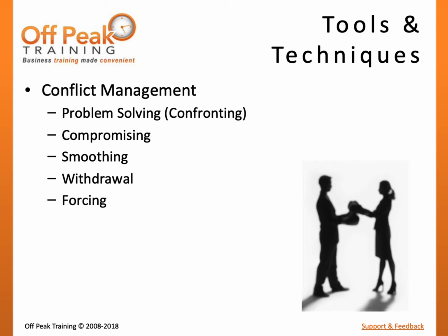Forcing provides a win-lose situation. One party's conflict is resolved while another party remains conflicted. This is not a preferred resolution. Decision-making may include negotiation or voting techniques, such as majority, plurality, or unanimity.